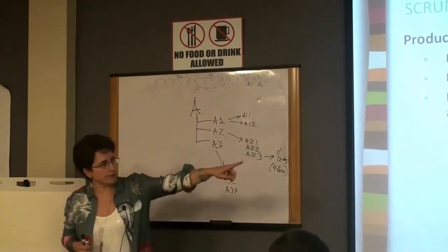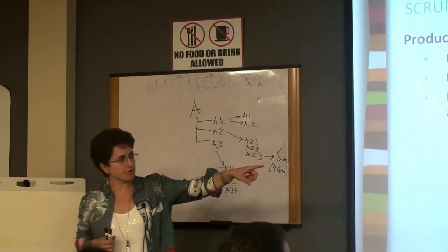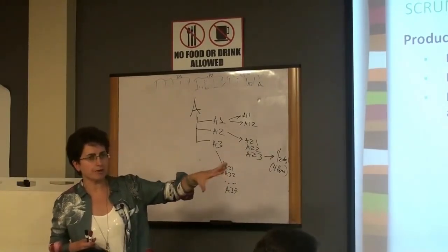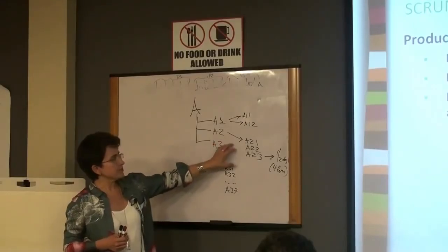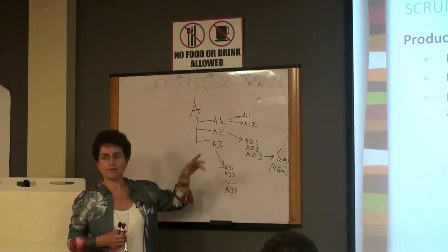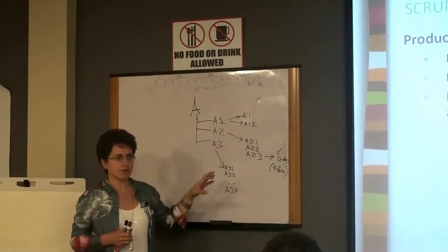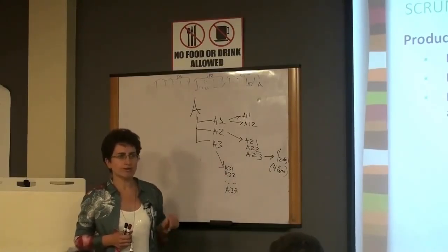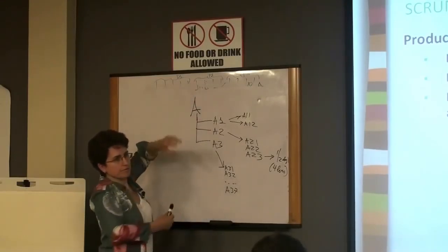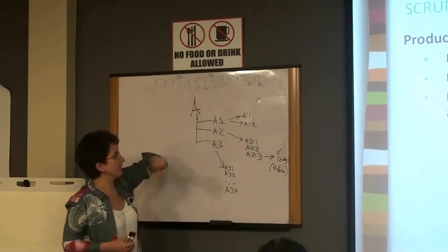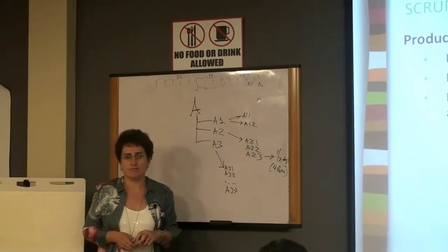So basically, bucketization of your features into small, medium, large is one way of projecting your time estimates, and this is another way. You break down complex features into smaller pieces until you have a good handle on how long each sub-feature takes to develop, and then of course you sum everything up. And then you have the total number of man days for this major feature.